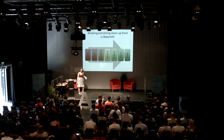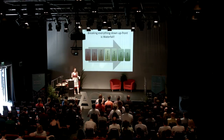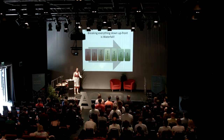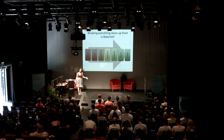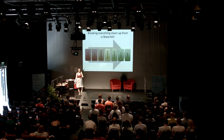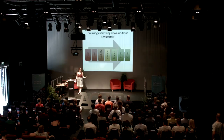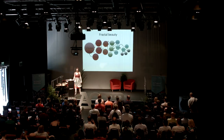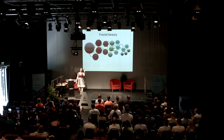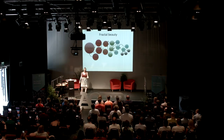I talked about how to break things down. Breaking everything down upfront would be exactly like waterfall — it's just a traditional way. I don't do it all upfront. I talk about what the vision is: if we go live with this thing, what are people going to be able to do that they couldn't do before? People have goals, there are stakeholders with goals. We get capabilities from stakeholders with their goals, and then I ask 'can you give me an example?' and already we start getting scenarios out. From those, we build features, carve things into stories to deliver incrementally, then we write some code. If that works on a project, you'd have this lovely fractal beauty.